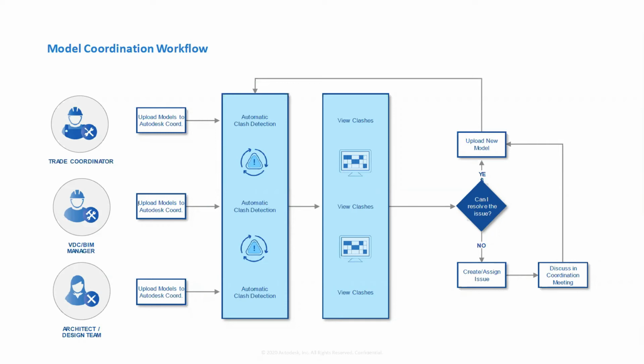If you're reviewing PDF drawings, for example, and you're setting up an approval, you can set up off the back of different templates like one-step approval workflows or two-step approval workflows, and you can say at what point, where does the document go. If it's approved, who does it go to? If it's approved, it goes there. If it's not, it comes back again and it's got to be answered. So it goes twofold.